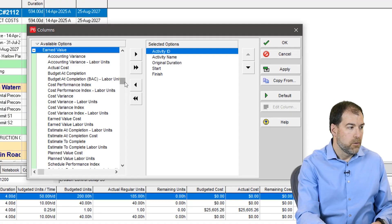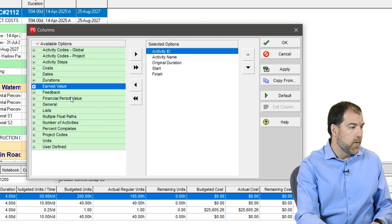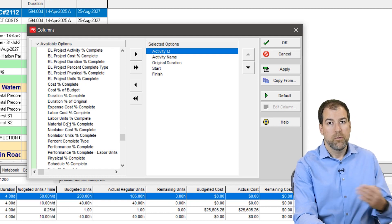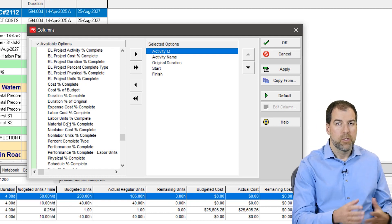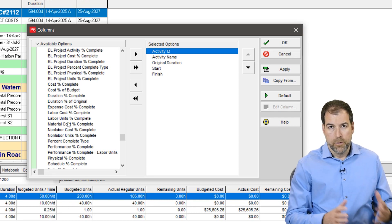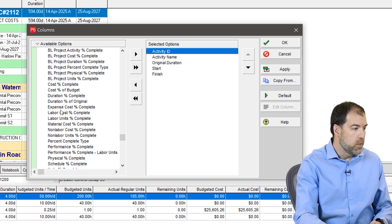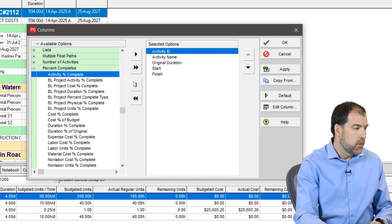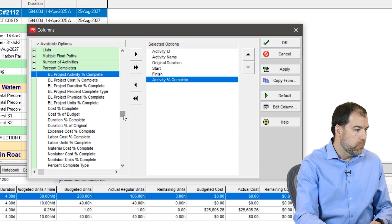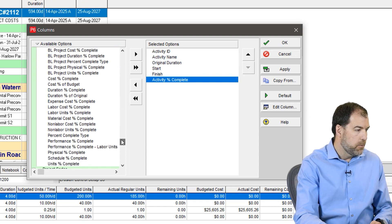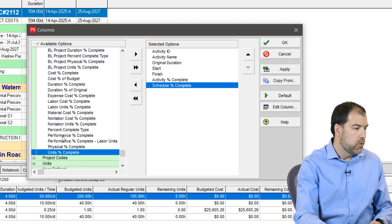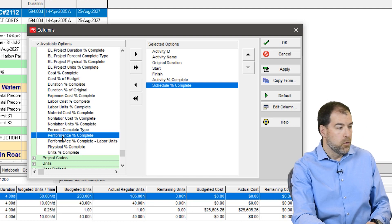We're going to pull some basic fields out. We're actually not going to start with earned value fields — we need to start with percent complete fields, because percent complete feeds into earned value as we're progressing and updating percent complete values. Those are also driving some of our earned value fields. The ones I like to put up are: activity percent complete, schedule percent complete, and — this one's really important — performance percent complete.